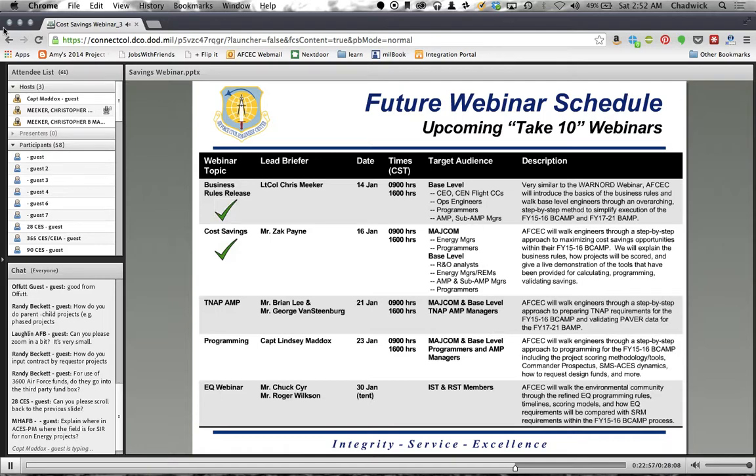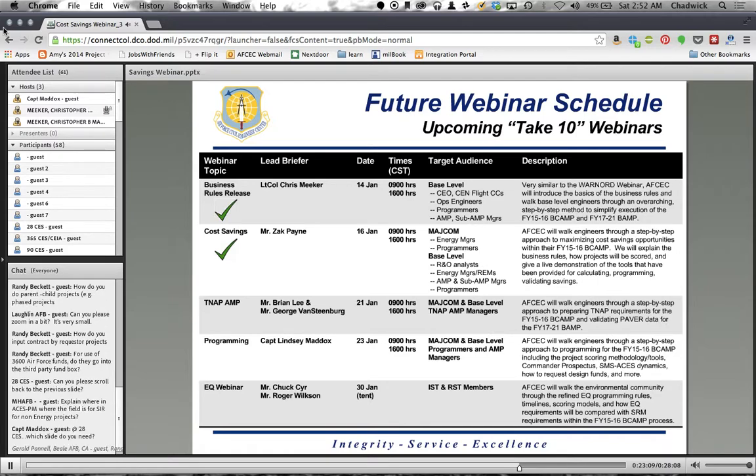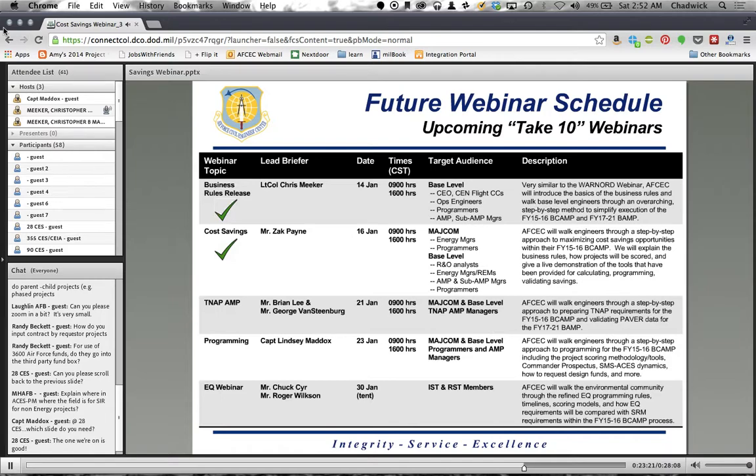If it's an unfunded requirement, meaning they're not bringing funds to the table, then we would consider it like we would all of our other projects, and we would assess it a risk score. So we look at it based on its probability of failure, based on the condition of that requirement, to see how it scores out, and then we would look at it based on the consequence of failure, so based on the MDI of that facility as well as the mission comp priority. That's going to give it its risk-based score.